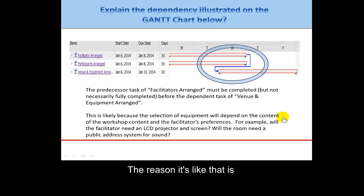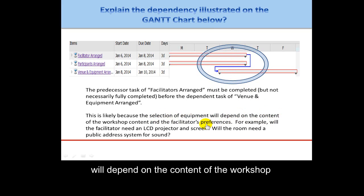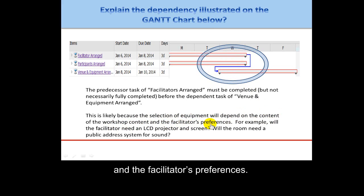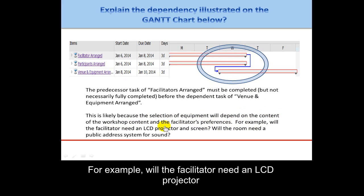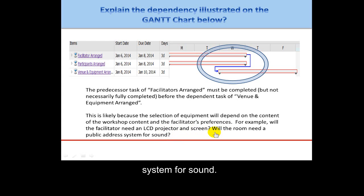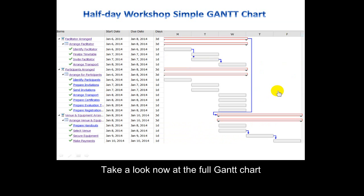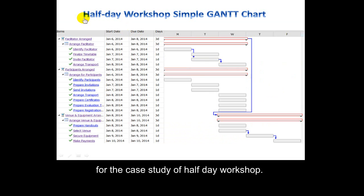The reason for this overlap is that the selection of equipment will depend on the content of the workshop and the facilitator's preferences — for example, will the facilitator need an LCD projector and screen, or will the room need a public address system for sound? Now take a look at the full Gantt chart for the case study of a half-day workshop.